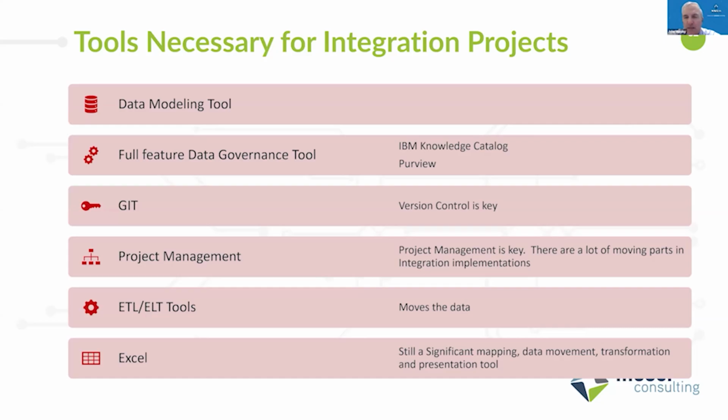So the data modeling is not the hard part. It's this mapping and recording and learning that you do that took the traditional 60% of the time. Modeling took 25% of the time, and the QA and the application took 15% of the time. That was a ratio you hear a lot, and that's a ratio that worked out when we built UDMH.